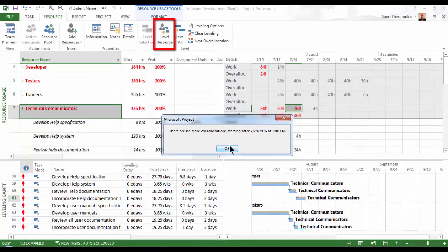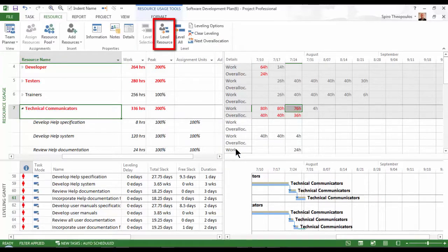There is Level Resource that allows you to select specific resources to level. Why would you want to do this? Ultimately, in a leveled project, our limited resources form a critical chain of activities that drive the end date of our projects. These resources represent our bottlenecks. By addressing our bottlenecks, we can achieve a critical path which is shorter in duration and based on logical dependencies as opposed to resource dependencies.